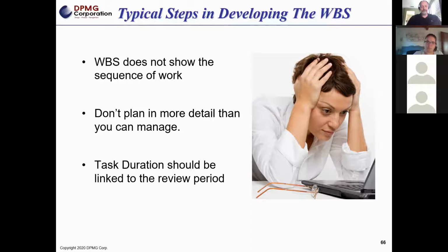Task duration should be linked to the review period. What that means is anytime you have a review happen, you should create a milestone. So as you're going through and defining your work breakdown, start identifying key points that you want to convert over to a milestone. Because a milestone is how I'm going to be measuring the completion of work and performance of my work over time. And then there's going to be duration associated with that review point.